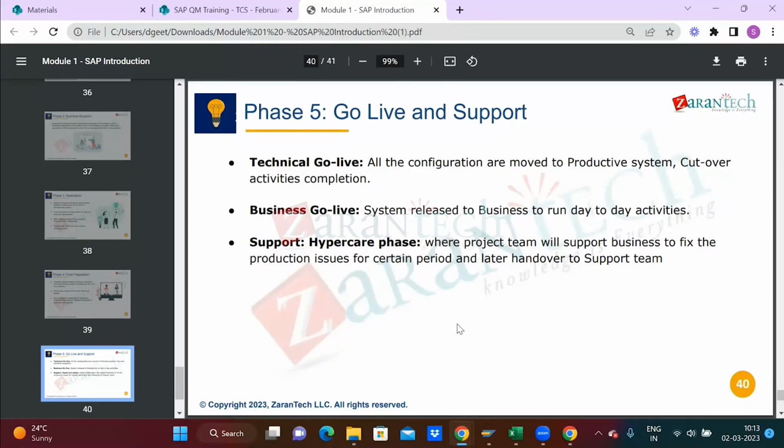Then they'll create sprint 1, sprint 2, sprint 3. For 6 months they will plan, for example, 20 days for each sprint. Sprint 1, these are the set of forms to be developed. Sprint 2, these are the set of forms to be developed. Sprint 3, these are the set of forms, testing everything. It's a sprint approach completely. We make a deal with the business that within this sprint, within 20 days, these many forms will be delivered. Once it is delivered, we go to the next sprint.